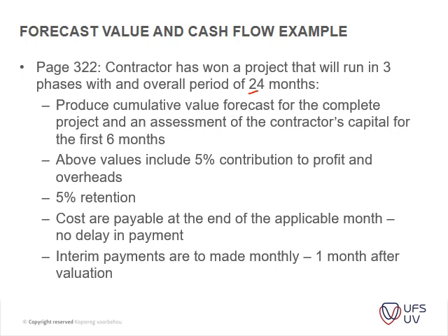And they made it quite an optimistic one, so there's no delay in payment. Interim payments are to be made monthly, 1 month after the valuation. So you've got 30 days after you submit your claim that you're being paid. Okay.